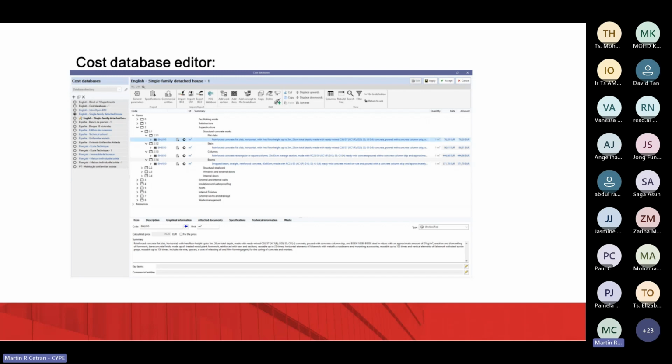Where do we have the information? Where do we get the information from? Our users, we have a massive number of users worldwide, by the way. I haven't mentioned that, but there are lots of them. Our users usually get that information from their previous BOQs. Maybe if they're new users in Open BIM Quantities, for example, they just get the information from last year's projects. The last year's BOQs already contain the descriptions of the solutions, the unit for measuring that, the description of the code for getting that, and then the price per unit.